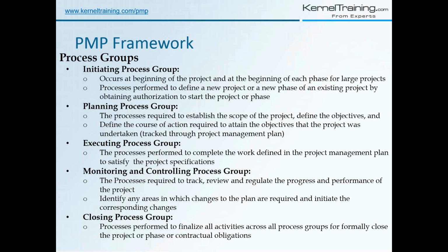It's not wrong if you say cost, schedule, and scope, but now when you are doing PMP, you should know what PMBOK says, right? So in the project management plan, there are three baselines: scope baseline, schedule baseline, and cost baseline. And the complete performance on the project throughout the project is measured against these baselines, and we keep updating. See, when we are executing our plan, there will be some changes required, right? So as and when changes are required, there is a proper process for changes, how changes should be managed on the project. So that process needs to be followed.